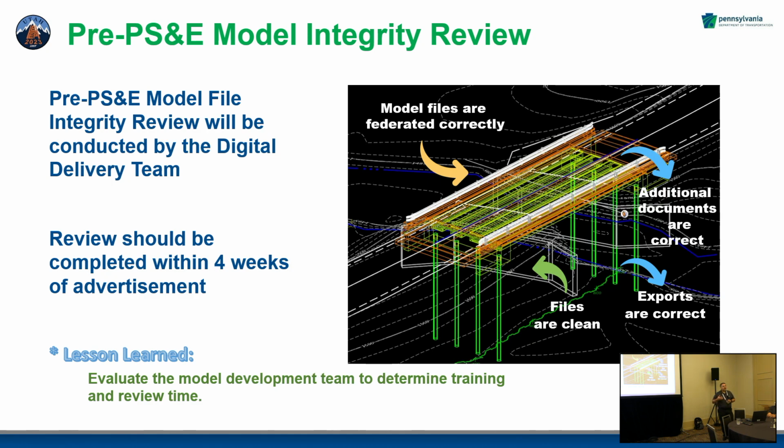So prior to the next pilot we did, we actually initiated what's called a model integrity review. With that process, the model is taken 4 weeks prior to it being let or advertised, put out there, it has to go through this integrity review.